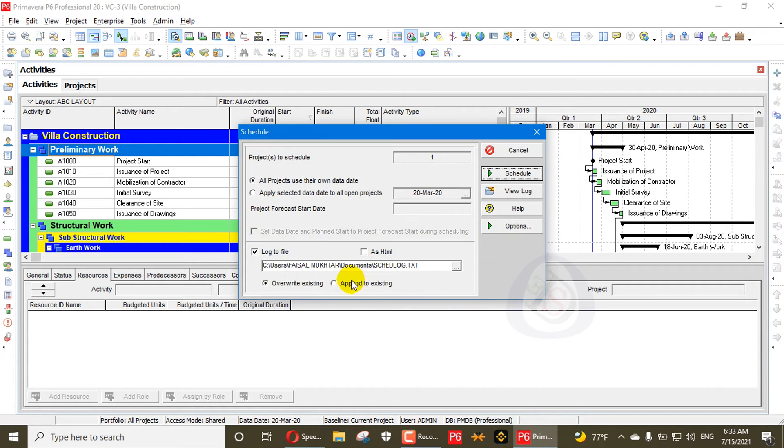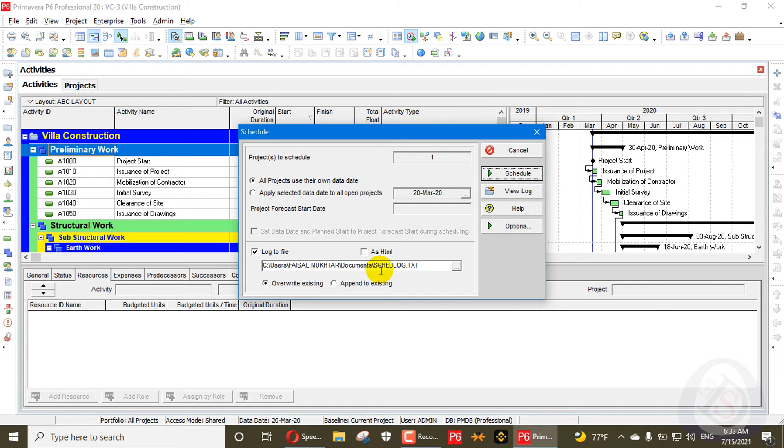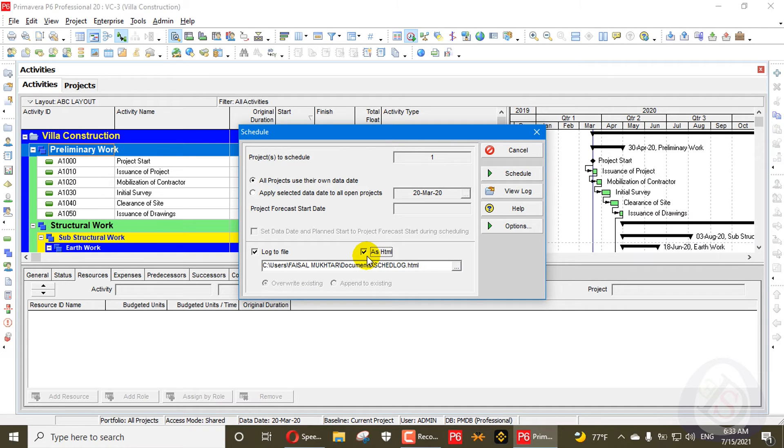You can schedule again and again. You can view the log. If you want to change the location of that log file and want to create a log file to submit to your client, you can create that log file for baseline and submit to your client. It's your choice.